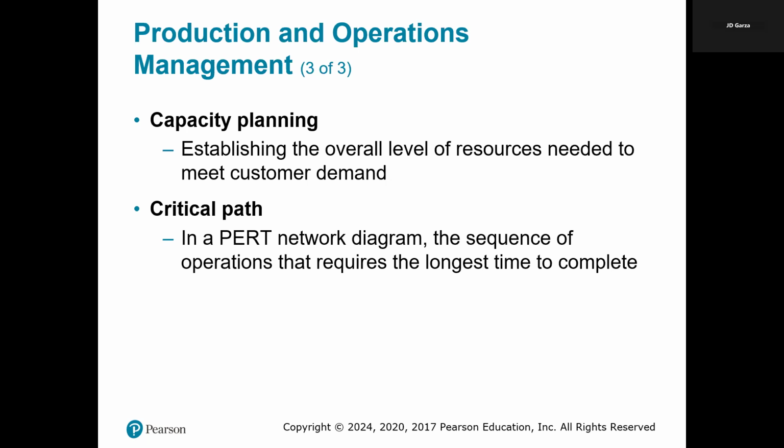Let's just say, for example, in building construction, this critical path could possibly involve laying the foundation, which also needs to be completed before other tasks, let's just say, like installing the framework, could possibly begin.